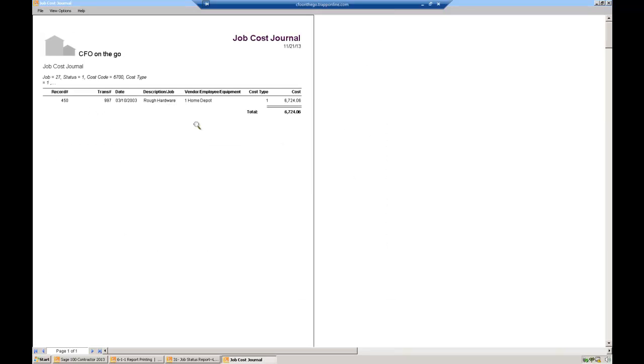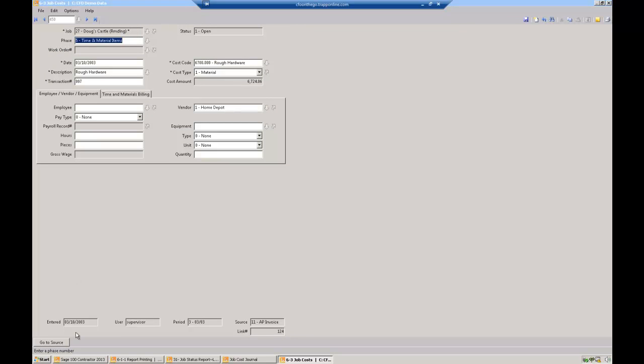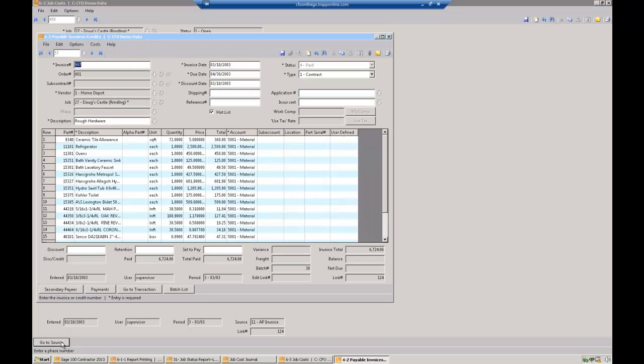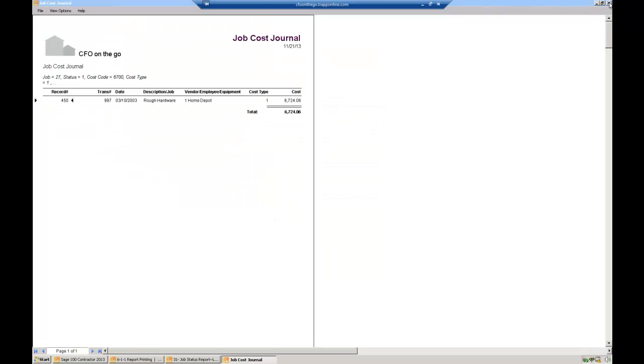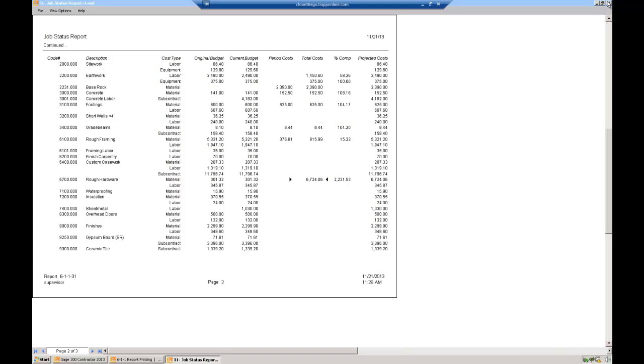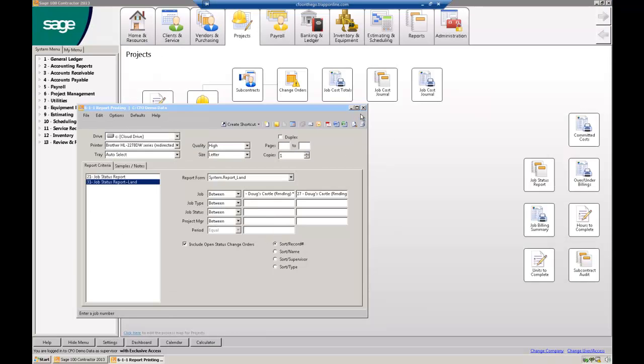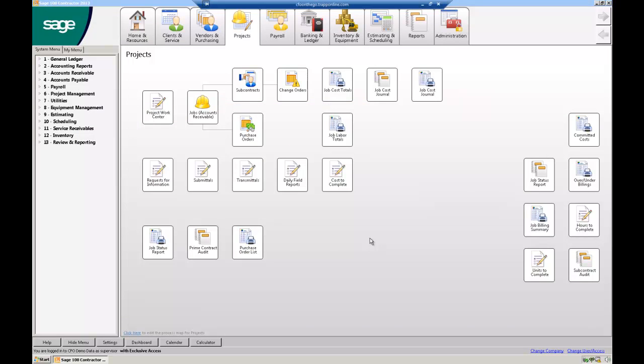Now, you can do this in Excel, just like I said. If you have software that's fully integrated, you can do something like that. I just did a couple of clicks there, and I got right back to the actual invoice that was entered in the accounts payable, and I can see exactly what I bought. And now I know, wait a second, that's on the wrong line item. I need to have somebody move that to a different line item. But I can drill back to that cost. If you're using Excel and QuickBooks, you get up and go ask somebody in accounting and pull that invoice. What did we charge for that job? Go pull the invoice and you can take a look at it. So that's committed cost. That's these three right here.